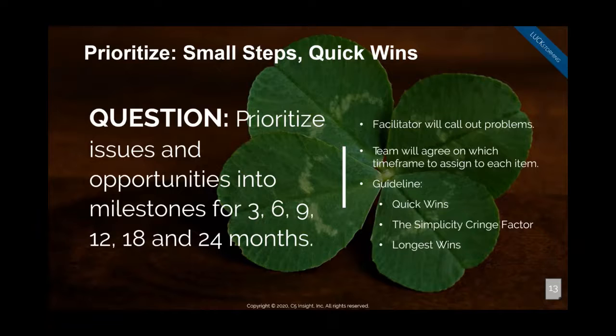That's fine. What you really want to walk away with, from a leadership perspective and the team's perspective, is that leadership has taken all those things and said, here's all the things we want to do, and here's the sequence in which we believe they should happen. Now, they might be wrong. You as the expert might step in and say, I understand you'd love to have that in phase 1, but it's going to take a long time. Or there are these other 2 things you have to do before you can even get it done, and those 2 things are going to take 3 months, so we can't do it until phase 2.